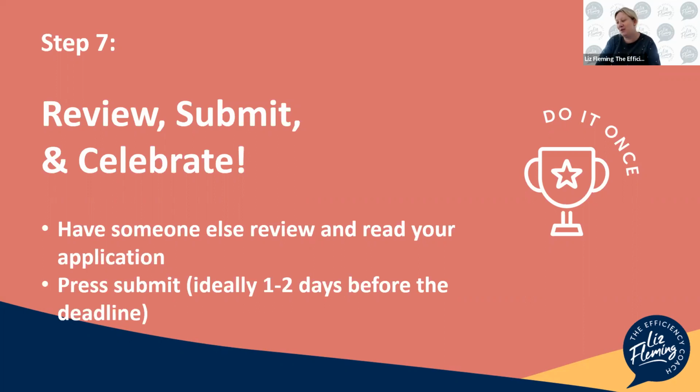Pressing submit. Now, this is always a nerve-wracking thing, making sure that you've checked all your attachments, you've checked everything that you're supposed to have in there. And when we are planning, going back to the first stages, I always plan that we're going to finish the grant application a couple of days before the deadline, just to create that buffer where there might be a delay, someone might be sick, something might happen.